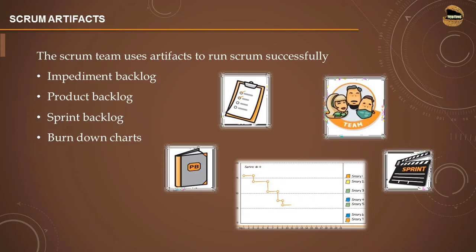All challenges are listed in the impediment backlog — for example, if a person was on leave during a sprint and a feature could not be completed or tested. The product backlog is the broken-down form of a user story into simpler task forms, representing the smallest unit to be developed in a sprint. The sprint backlog is sprint-specific, containing only those tasks from the product backlog which will be completed during a particular sprint.